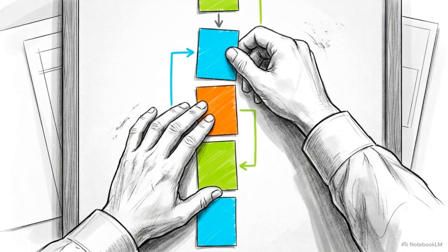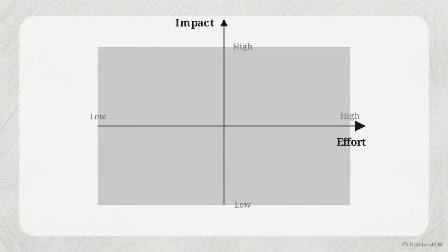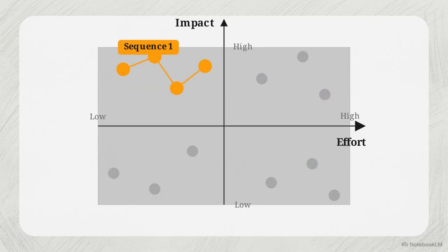With a clear view of reality, we move to step 3, prioritize ruthlessly. Leadership must decide the strict sequence of initiatives, rather than just approving a massive scope of work. This matrix plots impact against effort. To place your projects, weigh potential value against execution difficulty, dependencies, and urgency. Notice how only the most valuable, viable projects form sequence 1. Attempting to transform every department at once stretches resources too thin and stalls progress.